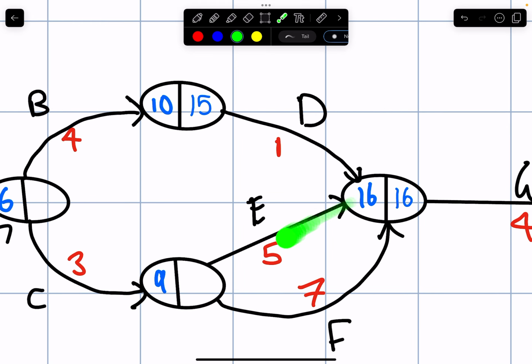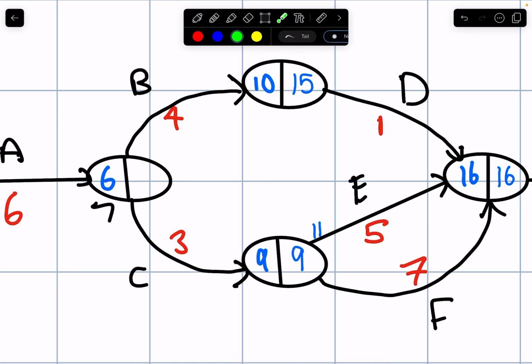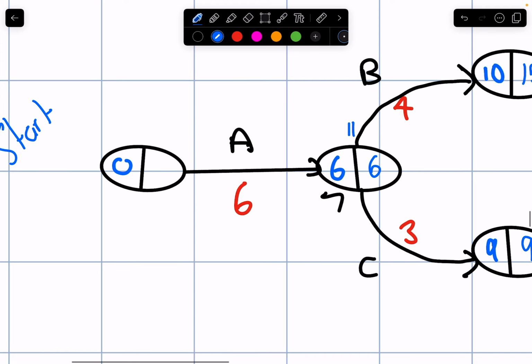Here we take the smallest number when we do our subtraction. So 16 minus 7 is 9. 16 minus 5 is 11, so we take 9, but we record 11 on the task that number came from. So coming here, 9 minus 3 is 6, 15 minus 4 is 11, so I put 6 in the bubble, and record 11. Now 6 minus 6 is 0.